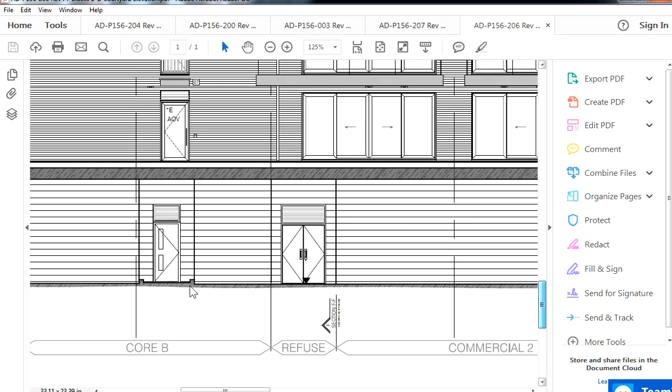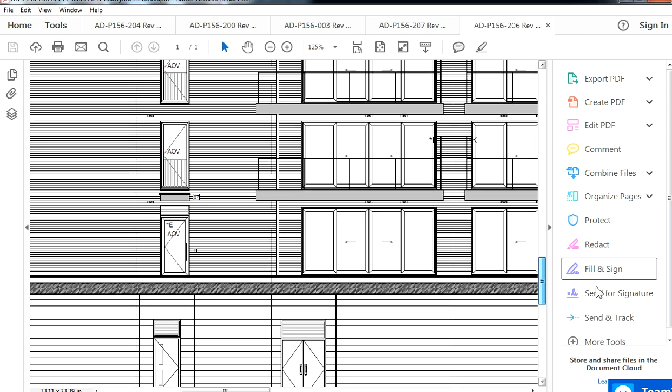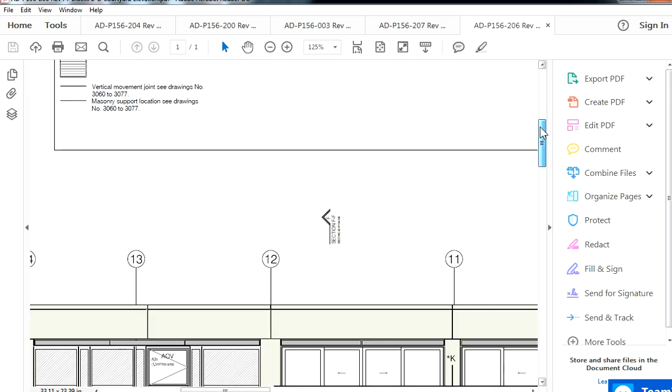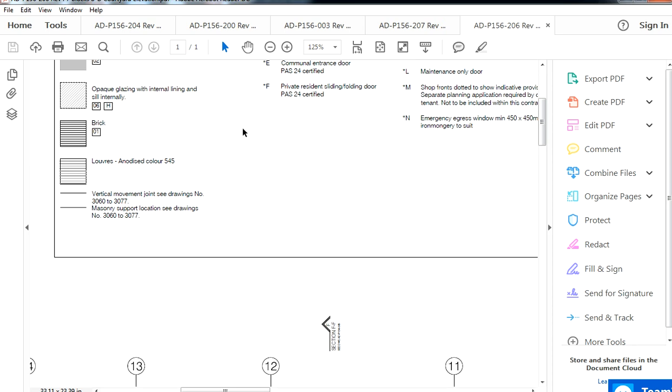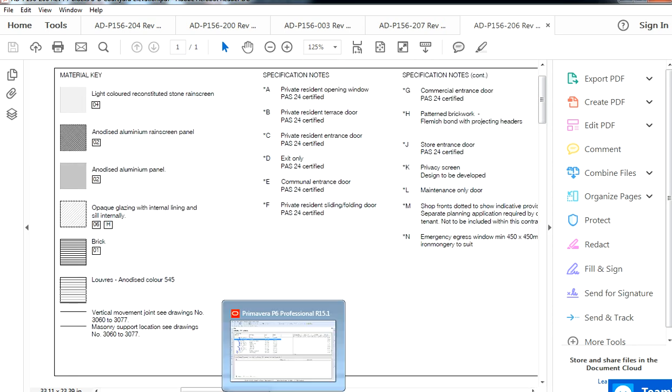Okay, so on the exterior, usually with drawings, just look at the annotations or the legends and come to the actual drawings themselves, look at the specs, and that would kind of confirm the scope to you of what is actually included. Okay, so you know you've got a rain screen cladding system, you know you've got windows double glazed.